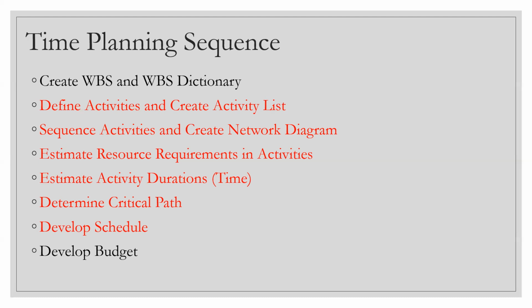Now, when you add up those time frames, those durations, you will reach a number of hours, or total man hours which you need on the project. And again, the cost of the resource per hour, or per week, or per day, or per month. And very quickly, you can find out the total man hour cost for this project.